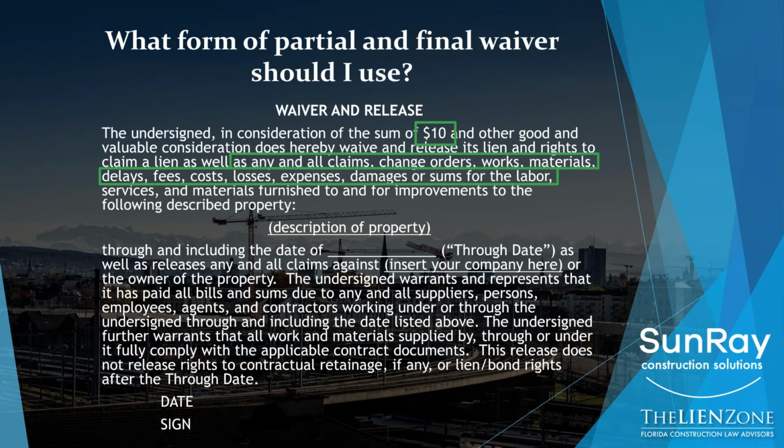You want to know that if I'm the general contractor and I hand my sub a check for $50,000 and they give me a release, that sub is not going to come back because the job went long and submit a claim for extended general conditions. And the way you do that is by getting a broad form release. The same is true if I'm a sub with my sub-subs, but the converse is also true.